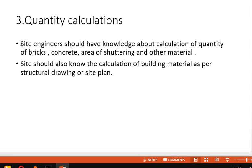The next duty is quantity calculation. This is very important for site engineers. You should have knowledge about the calculation of quantities — bricks, concrete, cement, sand, and aggregate. According to the plans and structural drawings, you have to tell employees how many bricks are required, what amount of concrete is required, and what cement, sand, and aggregate will be needed.